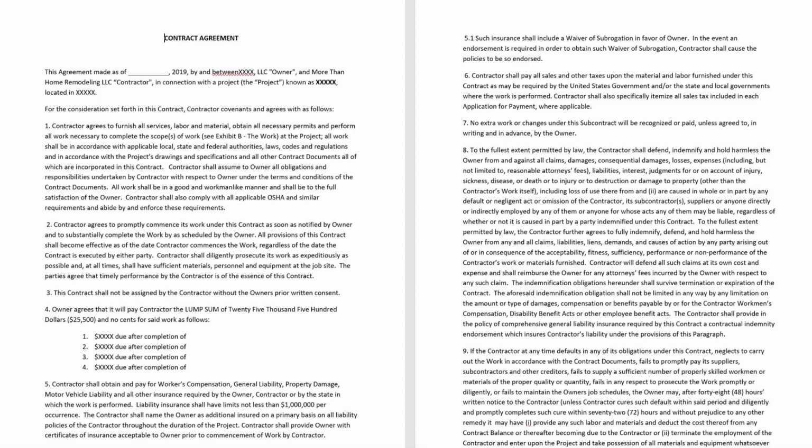And I just wanted to provide you with some templates here that you can take a look at and give you more ideas as you finalize any contracts and scopes of work you have. Last thing I'll mention, if it's a major renovation, the AIA, the American Institute of Architects, has residential contracts written by architects that are really well written in regards to a lot of coverage of things. And if your contract is probably $50,000 plus, that is something I would definitely recommend looking into.